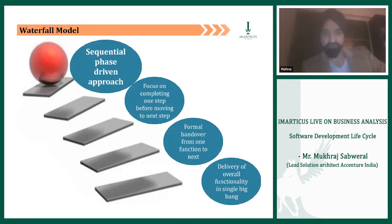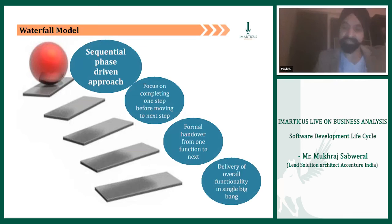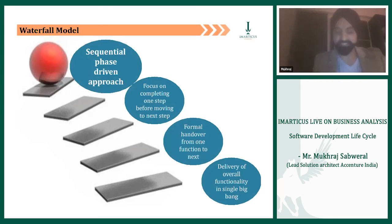Waterfall was a sequential approach — you finish one thing, only then the next phase begins. The business analyst completes the whole analysis, only after that it goes into designing. Once the complete design is written, only after that it goes into functional configuration and coding. When coding completely finishes and is signed off, it goes into testing. The focus is on completing one phase 100% before stepping into the next phase.